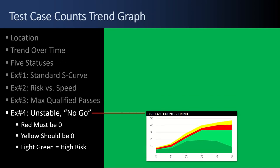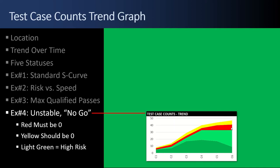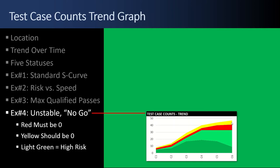And example number four for the test case counts trends. This is an unstable no-go. The red should be zero. You should make a decision. If those reds really aren't critical or high, then make a decision to defer them or flip that test case to qualified test. Otherwise, if it's too big of a deal to skip, then don't skip it. Do another test cycle. But I look at this and say, oh no, something has to happen. You can't release with red. And likewise with yellow. If you must release, make a conscious decision and give visibility to it.